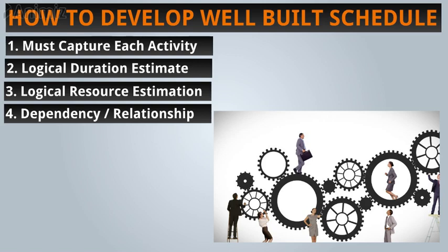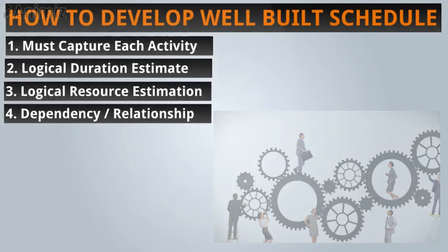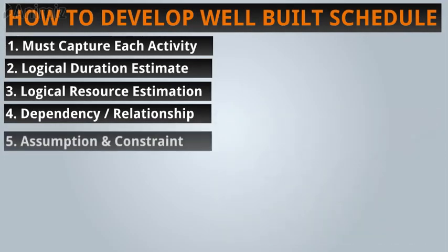Now this is the art in which a scheduler must be expert. This comes through the experience at site. How does each activity interact with the successor and the predecessor? Because if the schedule does not capture the correct relationship, then all you will require is to coordinate a lot at site and will result in delay of the project.